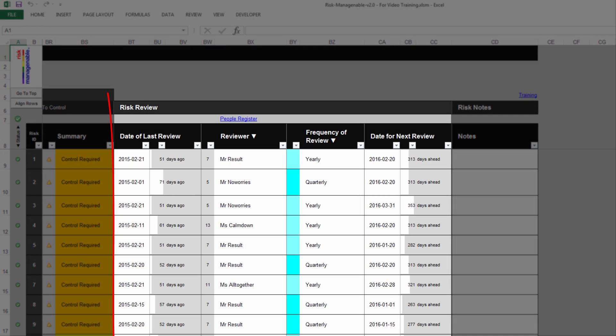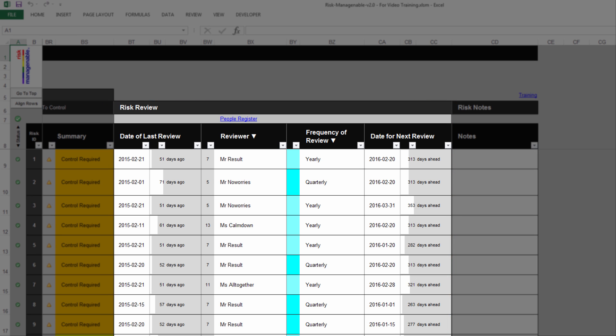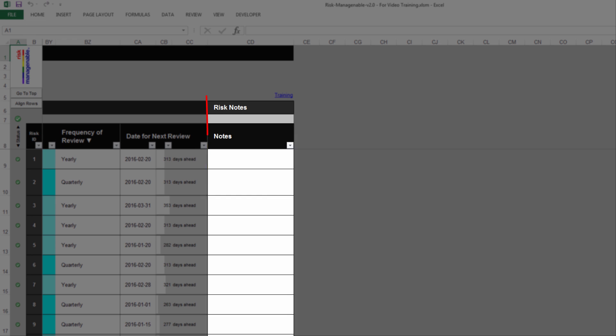The section Risk Review is where you record key information related to the regular follow-up of the risk. Like with any other reviews, you record the date of last review, the reviewer's name, the frequency of review, and the date for the next review. Finally, the section Risk Notes is where you type any comments you may want to add.